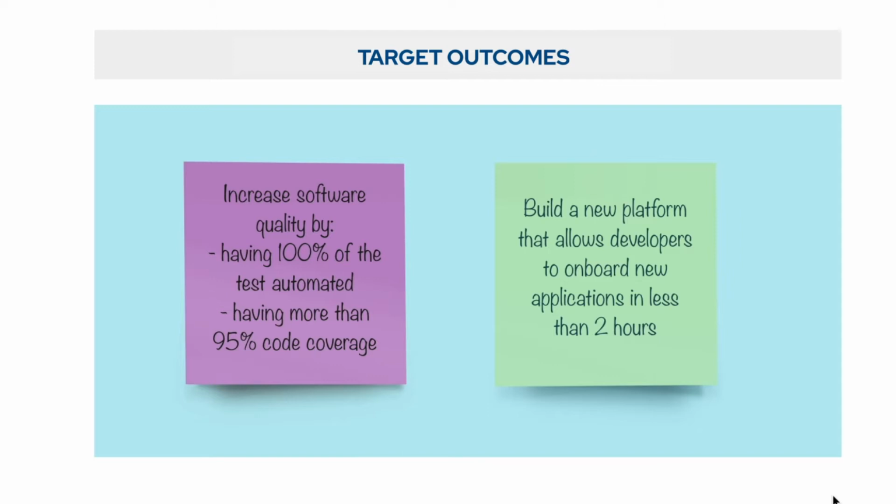Usually, it is a very common mistake to confuse outcome with output. So, let me put it this way. Outcome is the result, is the definition and measure of success, while output is the work required to reach the outcome. They should be measurable and can be revisited and updated as often as necessary.